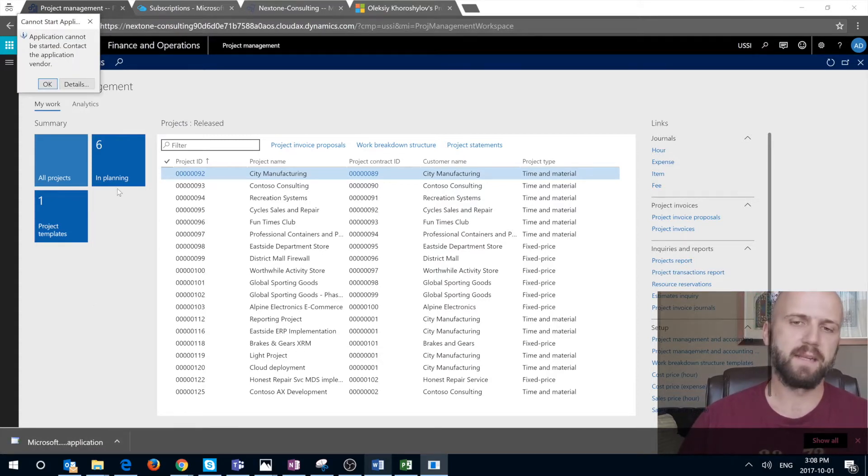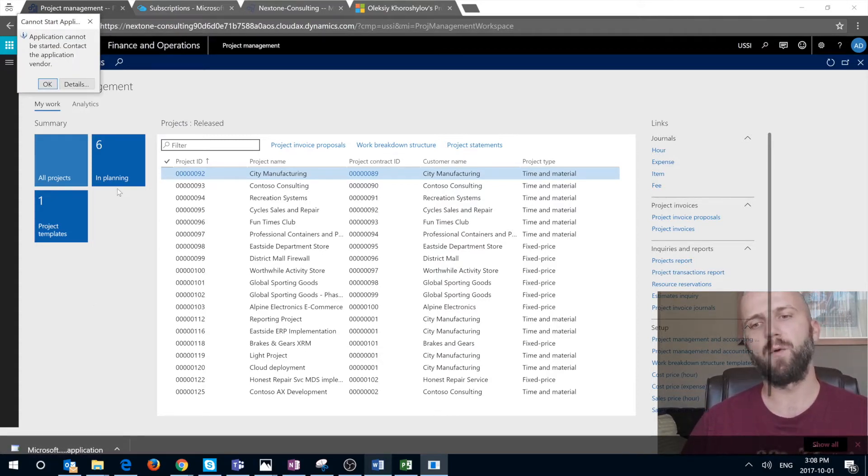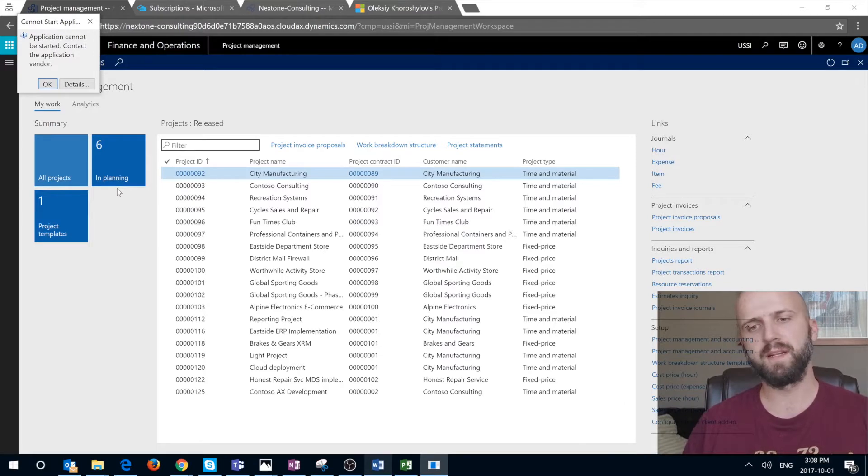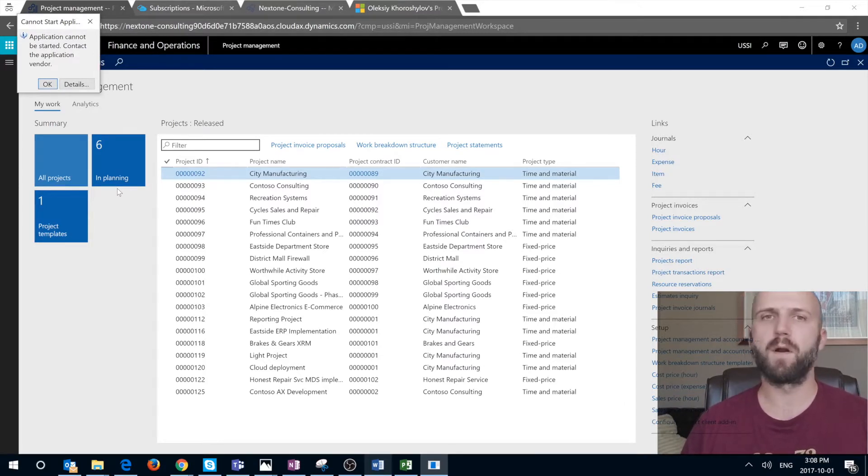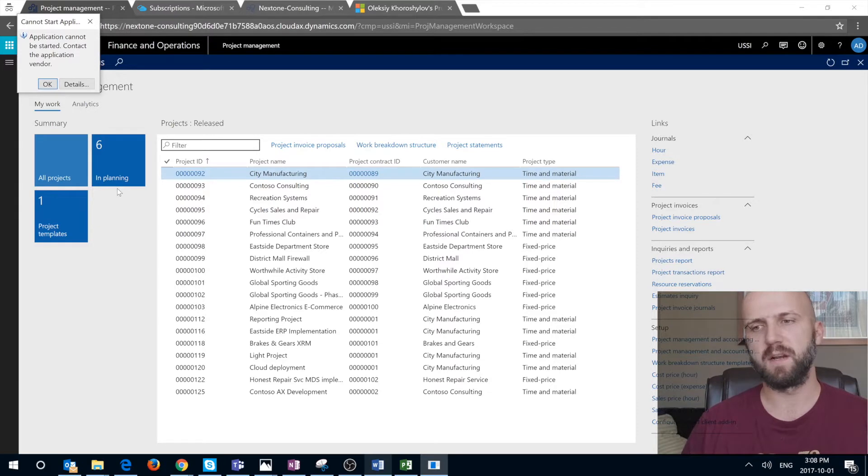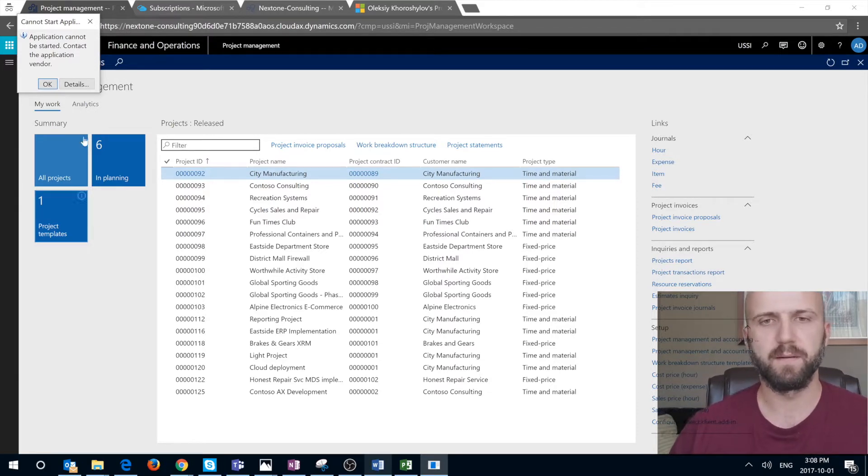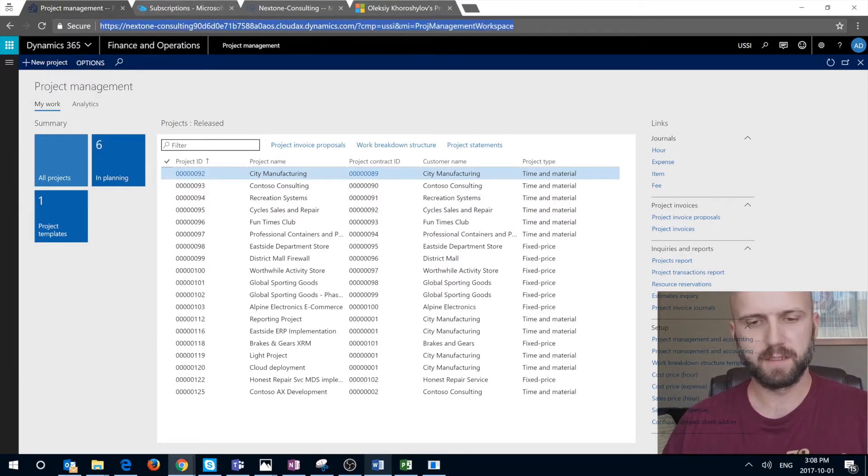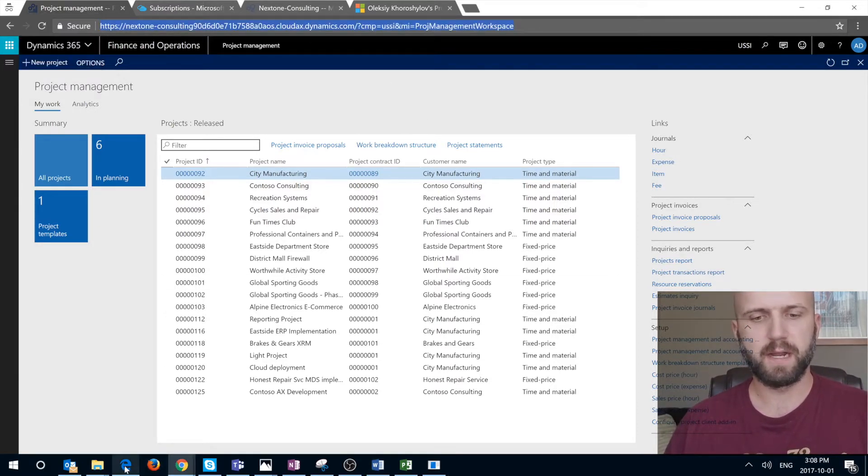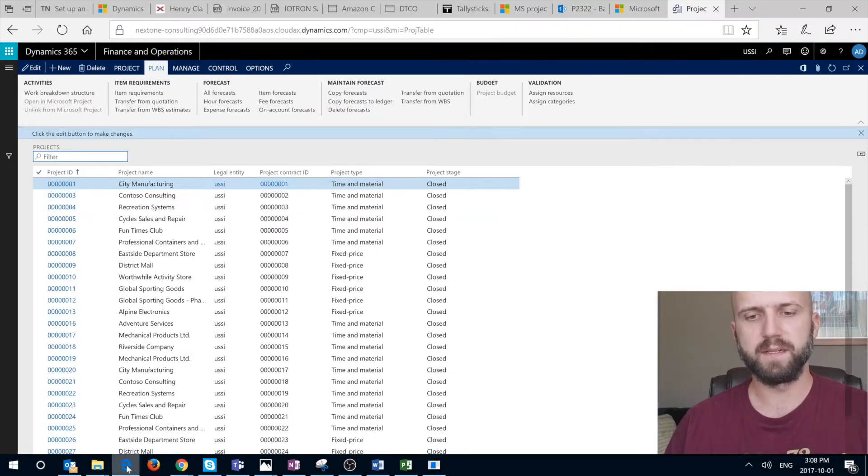One thing to keep in mind is similarly to how the workflows work in Dynamics 365, you have to open it from Edge. It does not work for Chrome. You're going to get this error. So I'm going to copy that URL and open it in Edge.